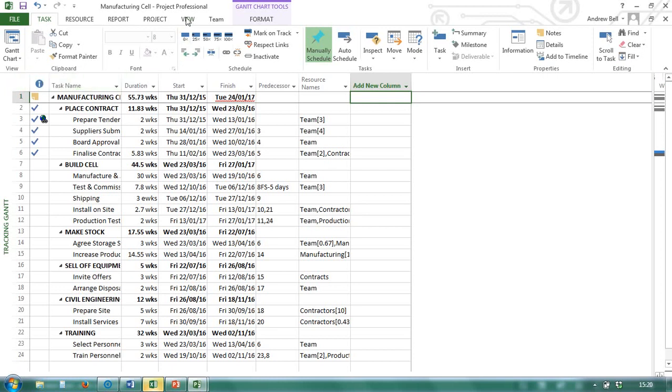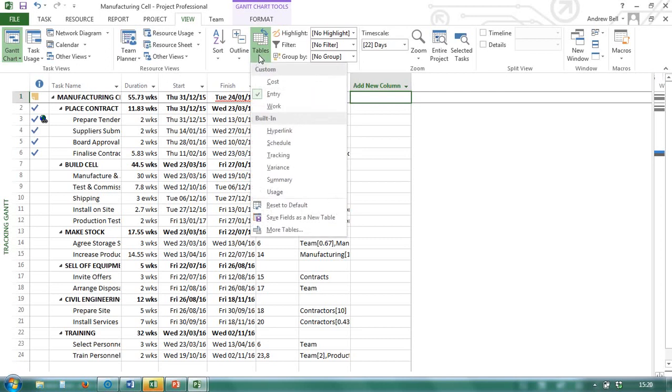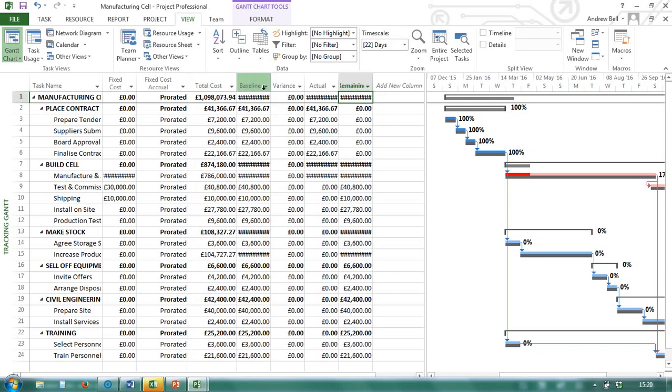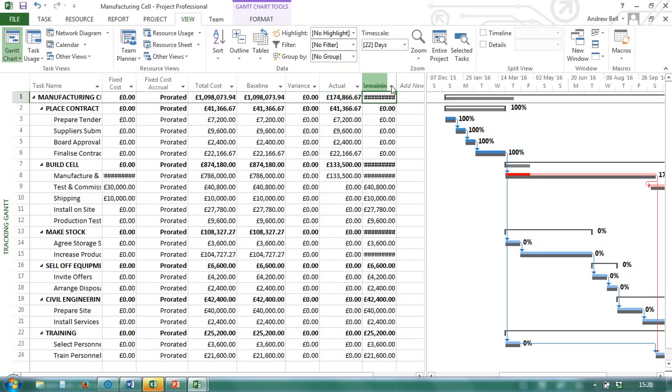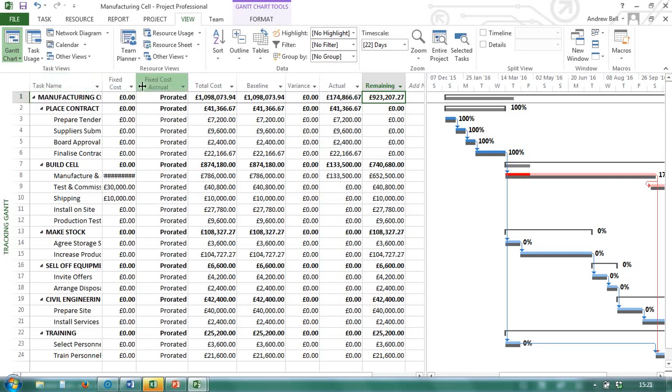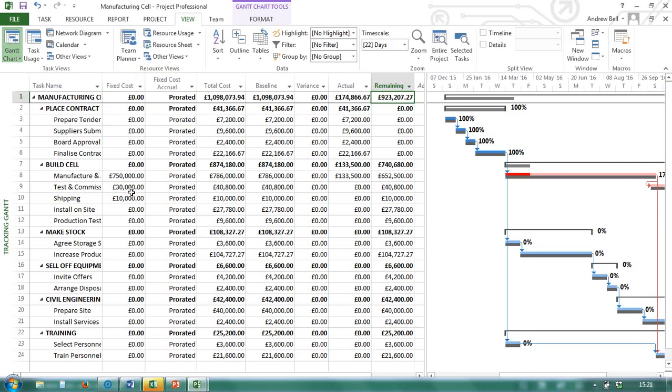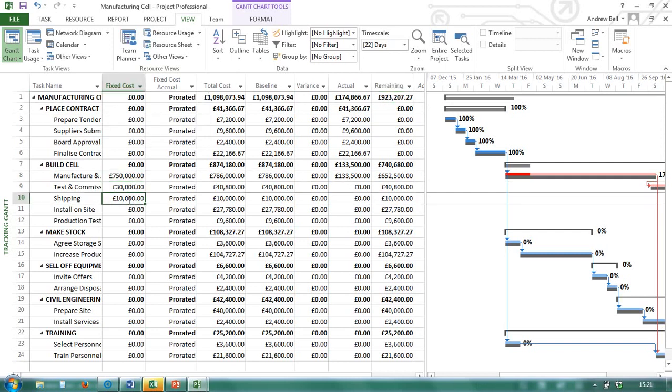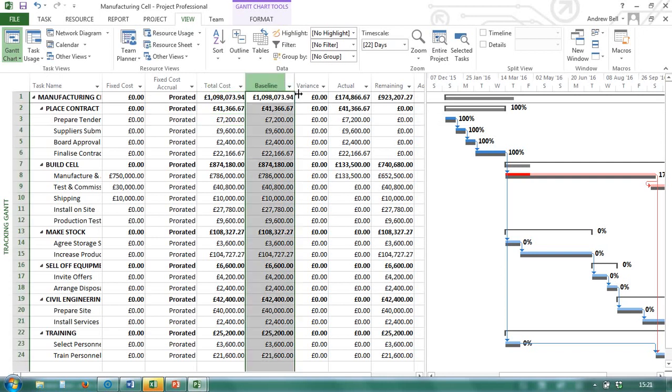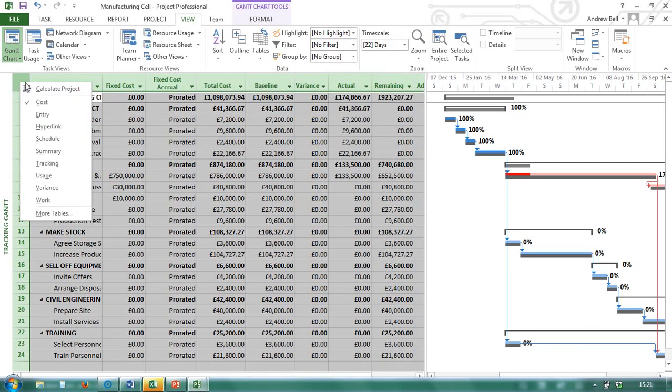If I go to the view tab, I can have a look at tables. We can see that the entry table has been selected here. Let's have a look at the cost table. I'm going to double click just to see the data in these columns. The cost table contains information from the database about the cost of the project. So these are fixed costs that I can manually put in here. The others will be the costs based on the labour requirement. This project is baseline so you can see that there is a baseline cost. And there are actual figures in there as well.